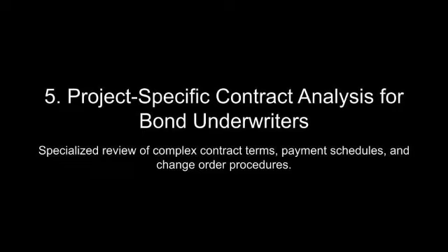outlined in the contract. Despite the legitimacy of the requested changes, the project owner's refusal to honor them created delays and financial strain, ultimately triggering a performance bond claim. These examples underscore the importance of procedural rigor and documentation in mitigating disputes.